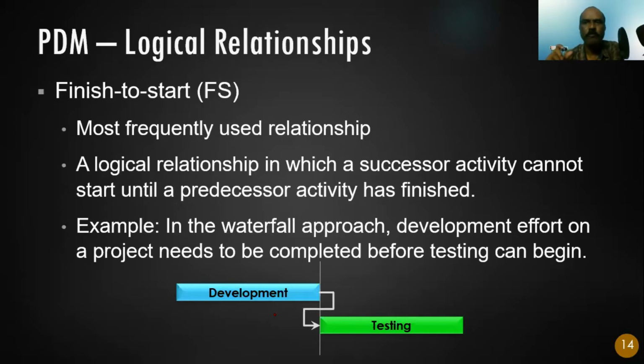For example, you need to finish this PMP training before you submit the application to PMI. So you cannot submit the application to PMI for the PMP exam before you finish this training. So this is a prerequisite. The finish of one activity triggers the start of another activity.